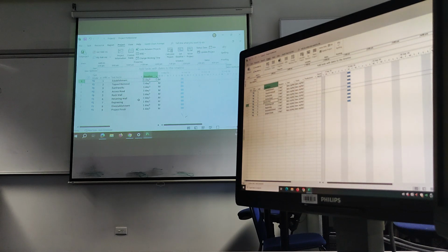Okay, number 2 is topsoil removal. Just work with me here, don't sort of try to get ahead. So, topsoil removal. How do we calculate the topsoil removal? Size of the site. Okay, so the productivity rate we've been given is in what? Meters squared. Meters squared, right? So we're looking for meters squared. So we need to be calculating the area equals 60 meters by 100 meters